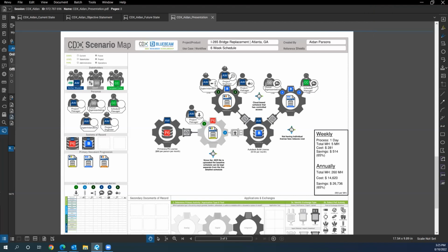Awesome. And then quick question, Aidan, are the inputs back into P6 manually provided from output that you generate in the Autodesk Build product? In this case, we would not upload back into P6. P6 would be used as the baseline schedule, and Autodesk Build would be used as the live schedule. It's creative.